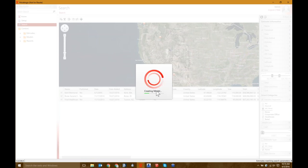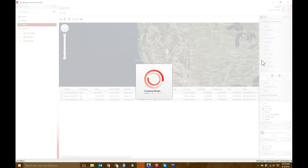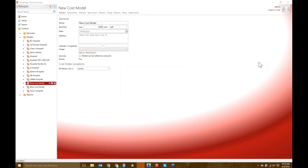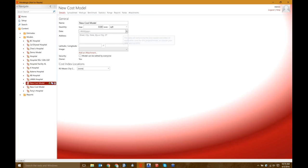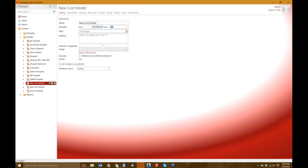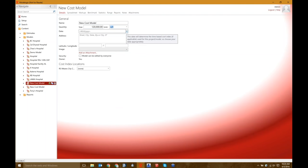So right now what it's doing is it's running the algorithms, comparing the three different projects to create a cost model based on a lot of different metrics, whether it's averages, and kind of running the numbers between the square footages and trying to normalize the data. Once we get to the next screen, we'll be able to enter our date and location for the project. So it will normalize the data by location and by time. So our client has asked for a 120,000 square foot building. We could also use different metrics. Say we could use beds, rooms, floors, whatever the metric may be, you can adjust for it as well.